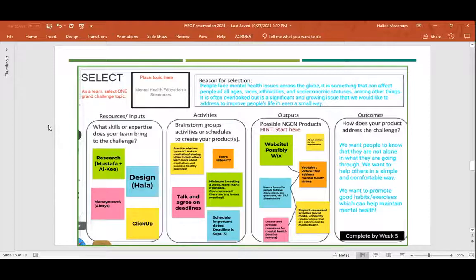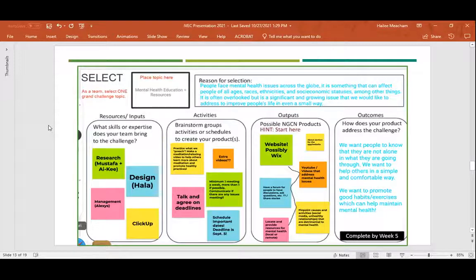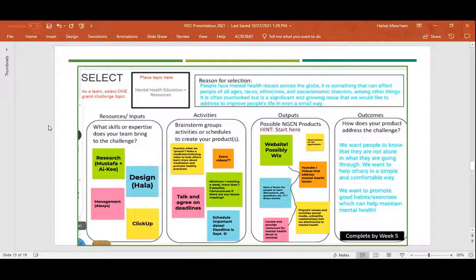Then you go big to small: starting with your outcomes — what is your goal? This team's goal was that they want people to know they're not alone in what they're going through, and to help others in a safe and comfortable way. Then you say, how can we do that? They were thinking about doing a website, integrating YouTube videos, and having a discussion forum. Then they asked how to achieve those outputs, and went over to the activities box to brainstorm — talking and agreeing on deadlines, making sure they had a solid work plan, and meeting at least once a week. Finally, on the very far left, the resources and input box is where they decided who would do what: Mustafa and Ike decided they would do research, Hala decided he would do design, and Alexis would be the project manager.